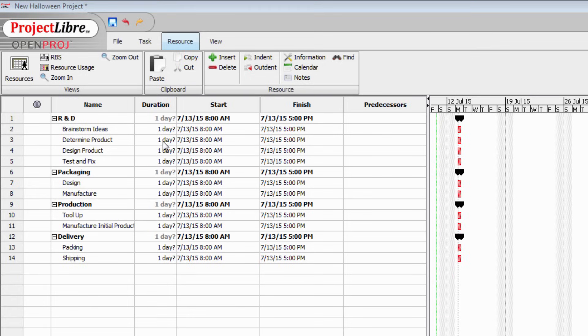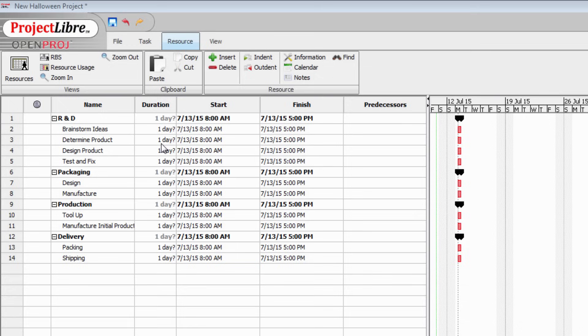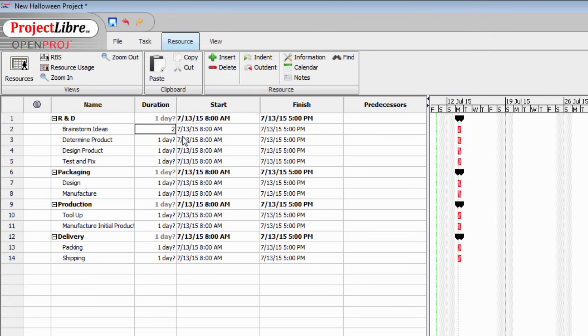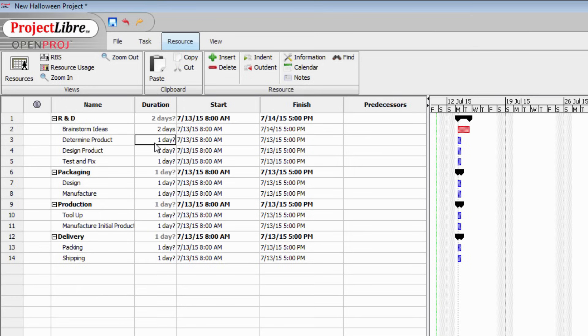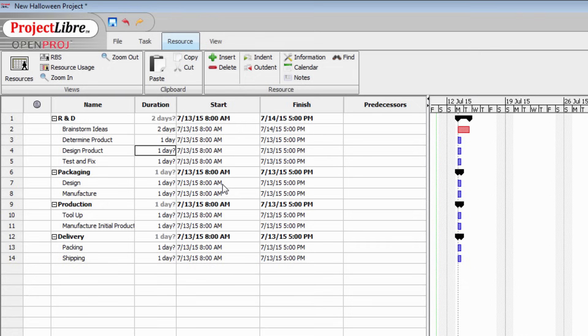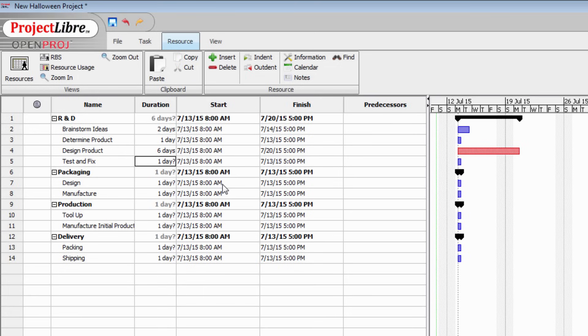By default, ProjectLibre assigns a one day duration to each of these tasks. Of course some of these are going to take a lot longer than a day. We're going to spend two days brainstorming ideas for our new product so I'll type two in there and press enter. You can see that the bar for brainstorming ideas has not only turned red but it's also become two days in length. For determining the product, it's going to take us one day. To design our product, it's going to take us six days. That's from experience. And testing and fixing it will take another three days.